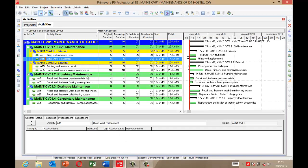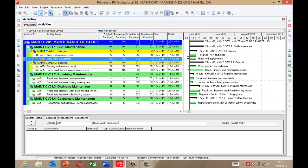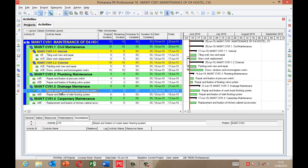To add predecessor and successor activities, you can use the tabs below — the predecessor tab and the successor tab — or you can use the bars at the right-hand corner. There you have rows, then resources, then moving down you have the predecessor bar and the successor bar. To do that, you select or highlight the activity you want.